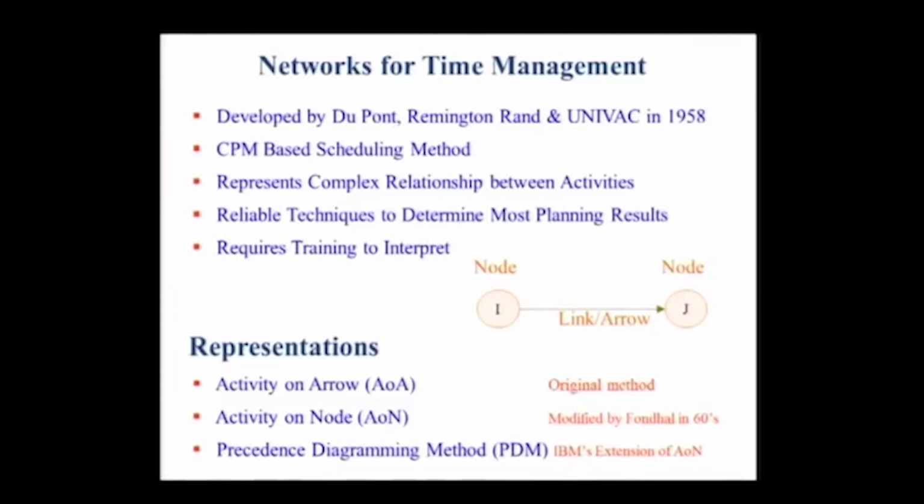Now when you take a network and you look at a project in terms of a network, what you have to understand is how we actually represent a project as a network. We have got clues so far. We are going to break a project into activities, we are taking those activities, we are sequencing the activities, and so on. So we certainly understand activity is one part of this network representation, and the other part is the precedence relationship, the relationship between activities.